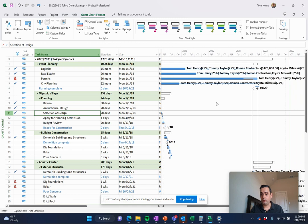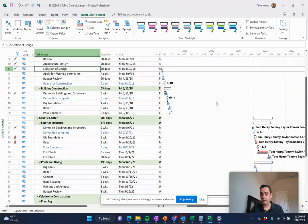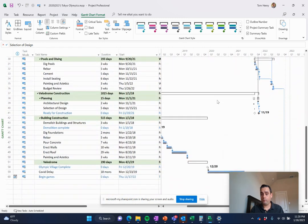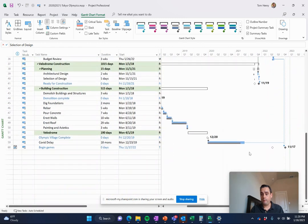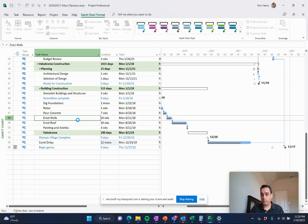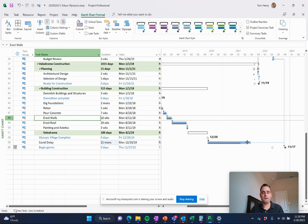So that if certain tasks do in fact slip or we pull them forward, you'll be able to see this one's actually been extended a little bit here. Let's make that a bit more apparent. So it's 18 months, let's make it 21 months. You can see the baseline stays the same, but the overall duration expands. Really cool stuff there.